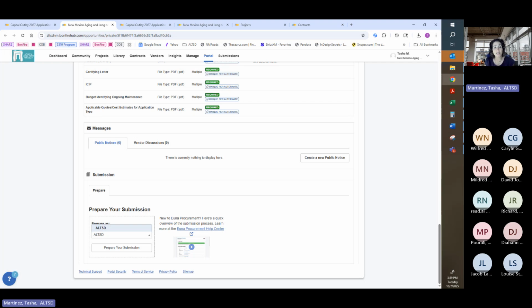Make sure that you're taking the time to get those budgets and quotes. I'm also strongly recommending that you add an additional 20% to your total. We are seeing huge shifts because of trade and supply and demand, so the estimates that you're giving us are not going to be the same estimates that you're going to need. We used to have you add 10%. At this point, I'm asking that you add 20%.